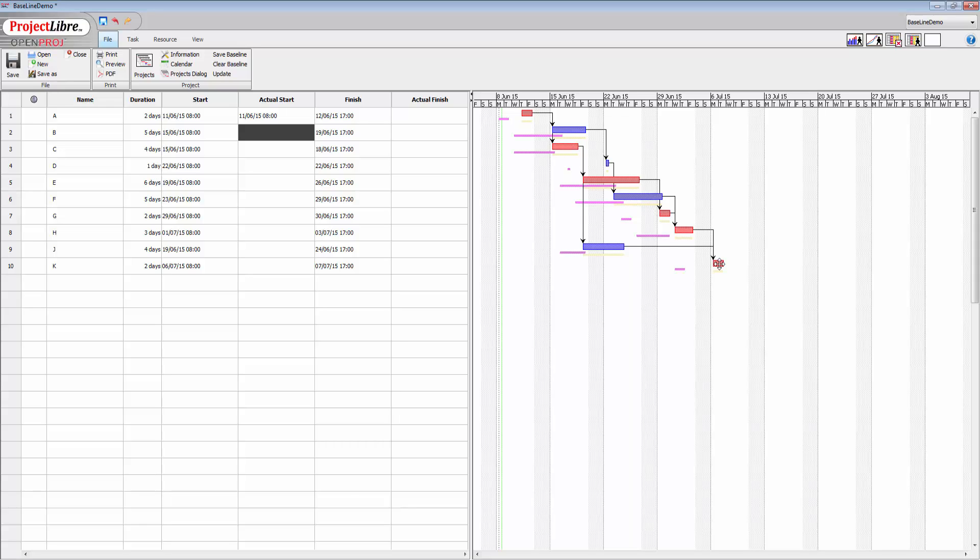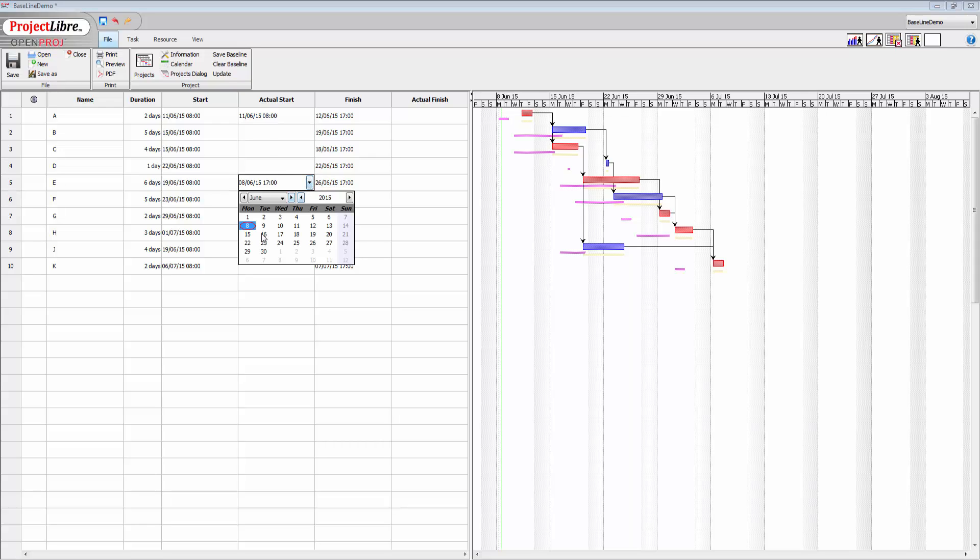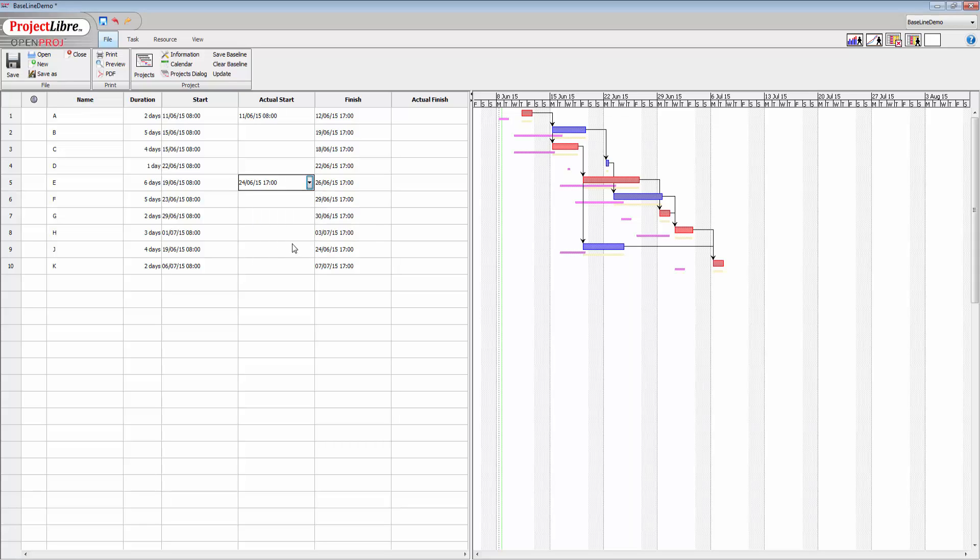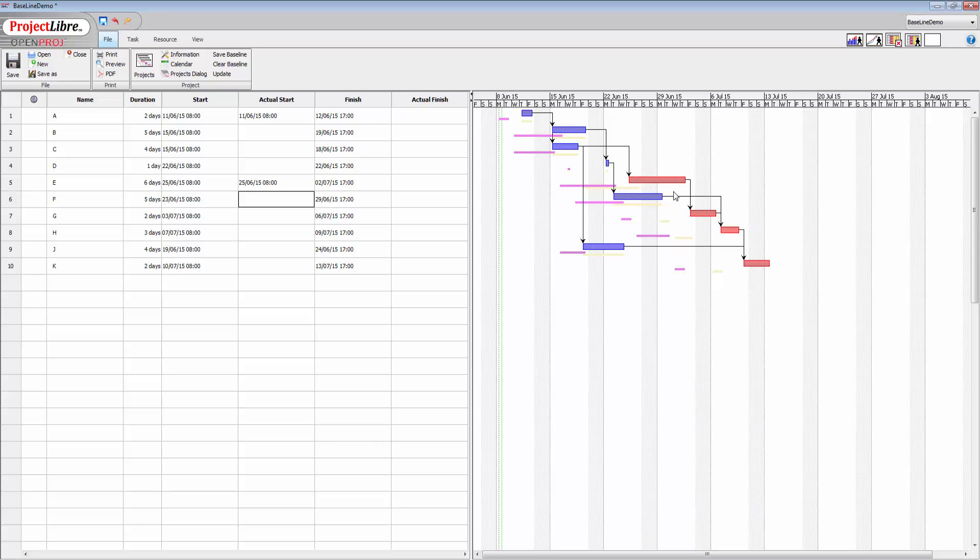So if for the sake of argument, instead of the planned start of activity E on the 19th, let's just see what happens if we delay that. So 19th is a Friday, so let's put it to the 24th and hit enter there.